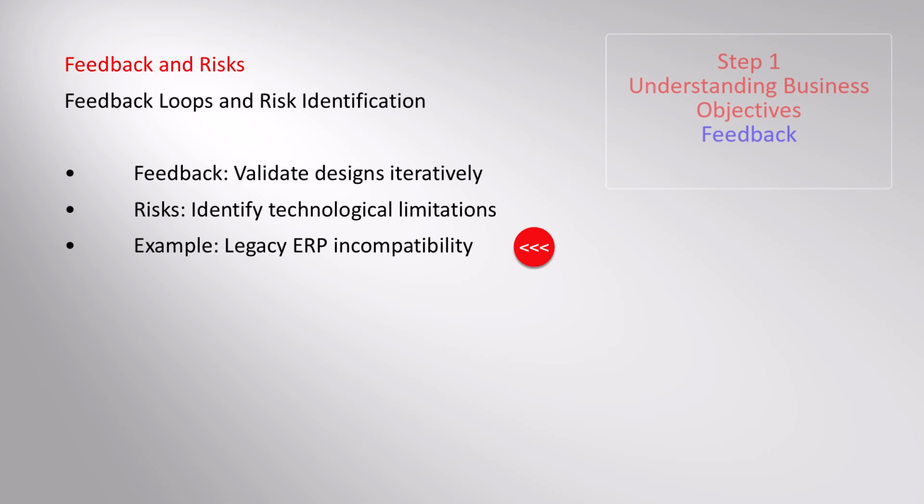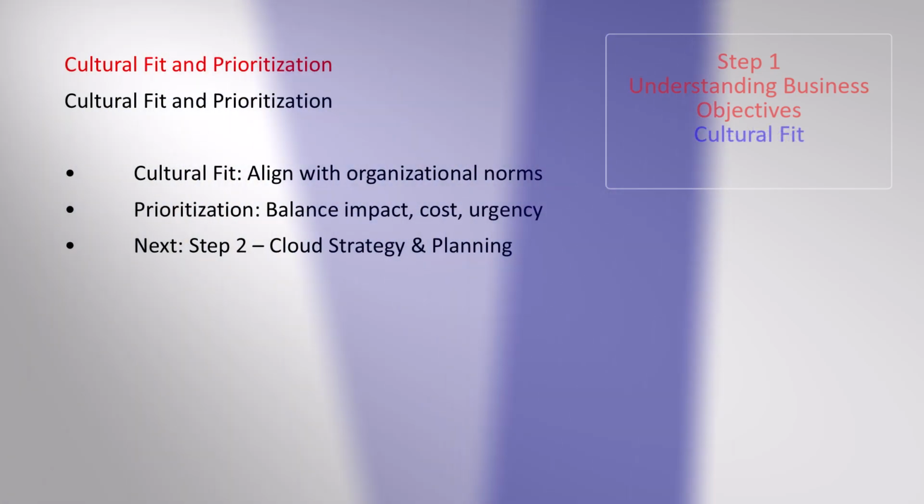An outdated on-premises Oracle database with custom extensions may not integrate seamlessly with Azure SQL Database, risking data loss, performance issues, or application failures without significant refactoring. Such risks can lead to project delays, increased costs, and operational challenges.